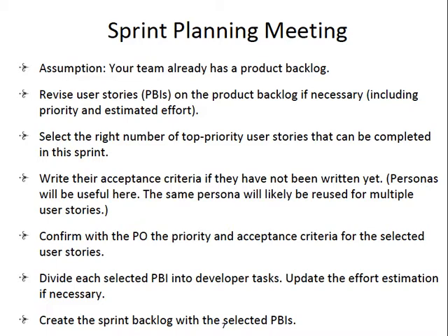And then perhaps the third task is saving something on the database or saving the booking on the database. So we already have three very obvious tasks. Maybe you may design slightly different. So the three tasks to book a computer are to create a data table for booking, a user interface to select the computer, and also the routine to store the data on the table.